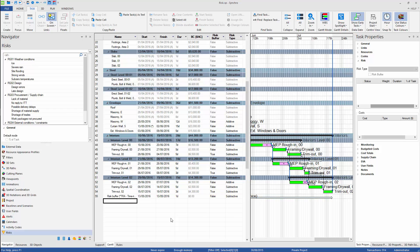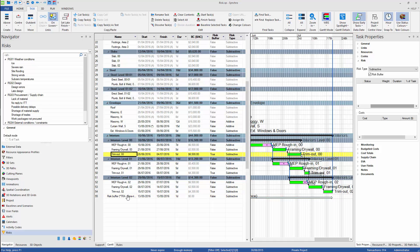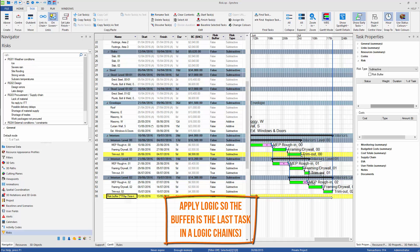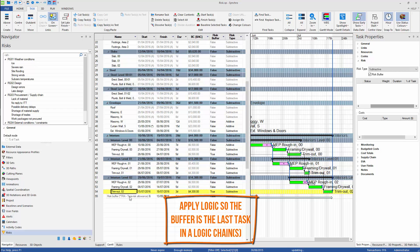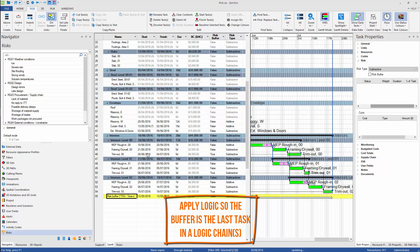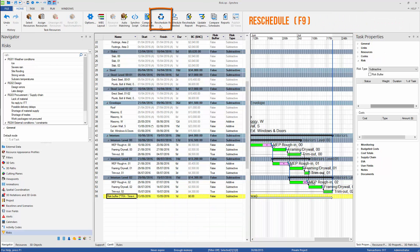This will simply move all risks to the task which acts as a buffer, usually at the end of the logic chain. This way we can keep the original program logic and accumulate identified risk in one place. That kind of buffer is sometimes called time risk allowance and is often placed between planned and target completion milestones.